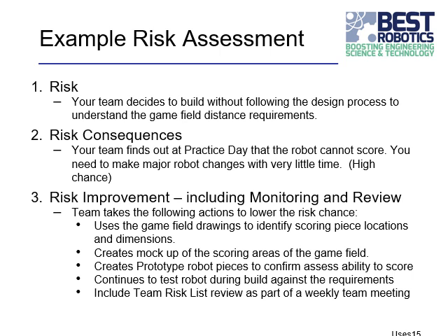If you know that it has to be less than a certain weight as you're putting pieces together, get a scale and weigh it. And then include considering the risks you've identified as part of a weekly meeting, so you don't forget that you needed to make sure you understood the game field distance. Have you taken that into account? So this is one example of the team not working functionally well.